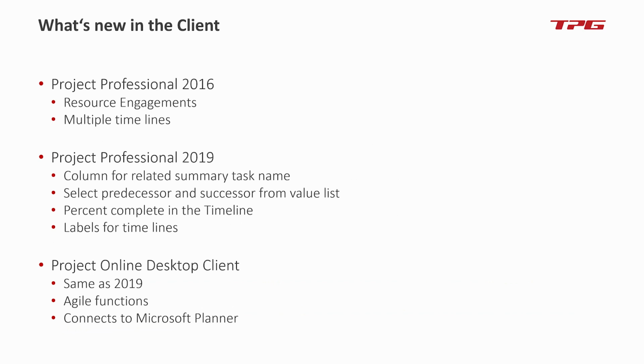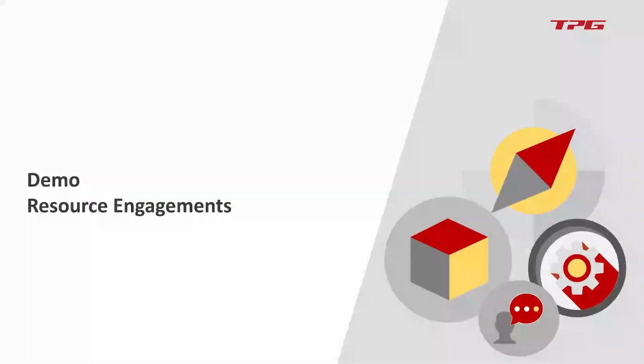Last but not least, but this again then only works if you have a Microsoft Office 365 subscription at all. Yeah, you can connect your schedules, for example, running in Project Server on-premise to Microsoft Planner for the detailed task and to-do management. So you don't have to plan every single piece of detail in your schedule, all the different subtasks and the to-dos, because you want to keep your schedule lean and clean. And you then, let's say, connect it to a Microsoft Planner where all the team members would then work on their individual small tasks and work items.